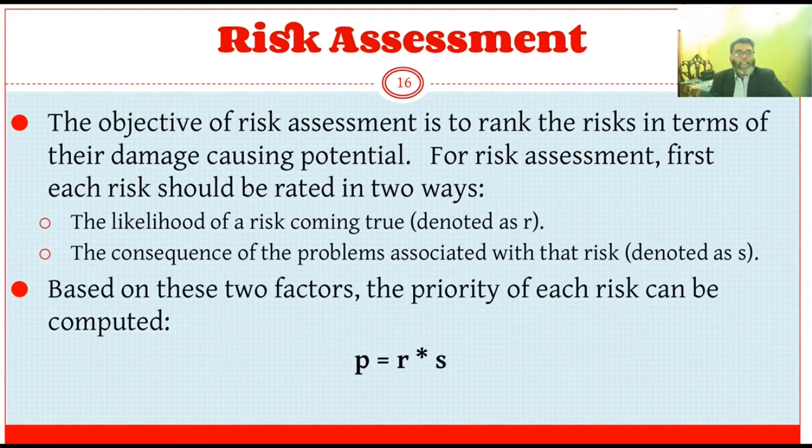Five risk management process steps combine to deliver a simple and effective risk management process. Identify the risk, analyze the risk, evaluate or rank the risk, treat the risk, and monitor and review the risk.